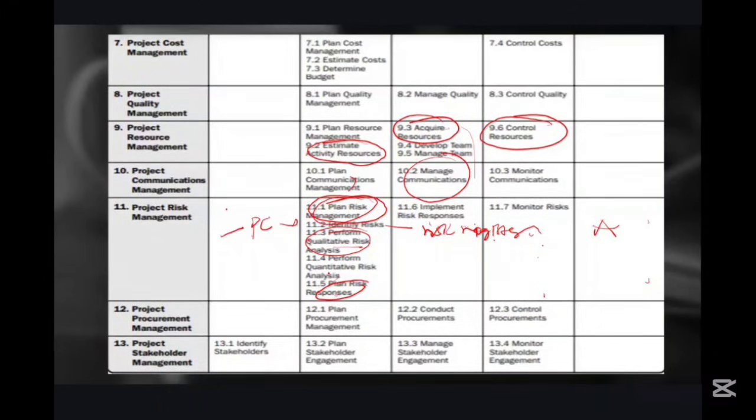All right. Once we understand the risk, we can respond to it. If you don't understand, you can't respond. You understand the light out risk, the blackout risk, and then you respond, whether you accept it or mitigate it. Maybe get a generator, or accept the risk. When the chances are low and the impact is low, you could accept it. Chances of light out in the UK are very low, so no need for a generator. The impact is very low because maybe you have solar in place. So accept it. But if it's highly likely, you need to have a maximum response.